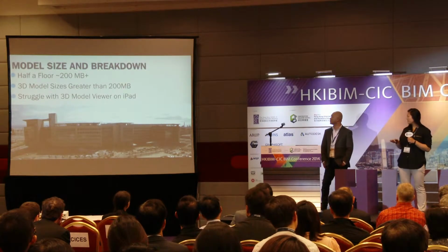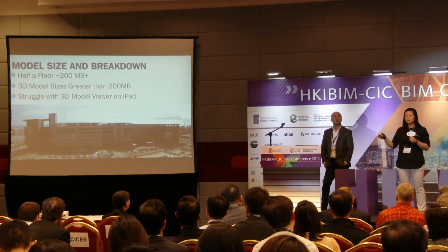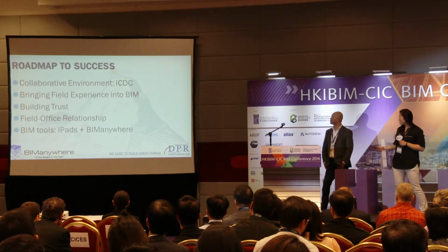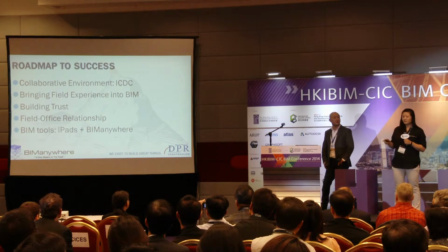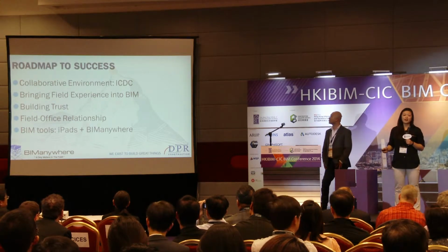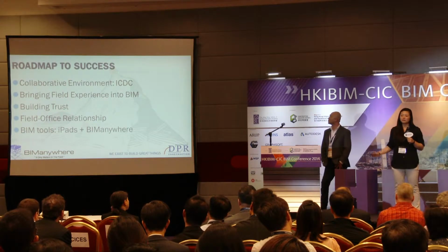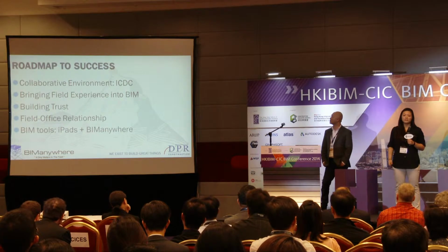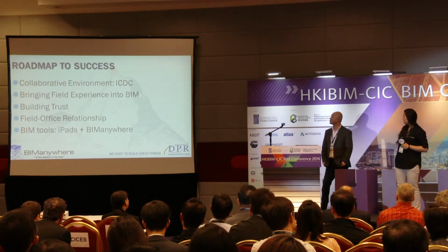And they're actually doing a lot of great things with that model, adding more information and doing some other integrations. So our roadmap to success for this project, one, the collaborative environment, the ICDC. I think that's really key, having all the major stakeholders sitting in one central location. Issues can get solved really easily, really quickly. We just had a very good collaborative environment.